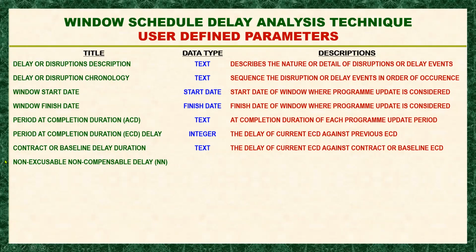We are talking about the claims. So there are 2 kinds of claims. Later we will explain it to you. Actually, there is a claim for the cost and a claim for the time or extension of time. So the extension of time claim is the work of the delay analyst, a planner or a scheduler.